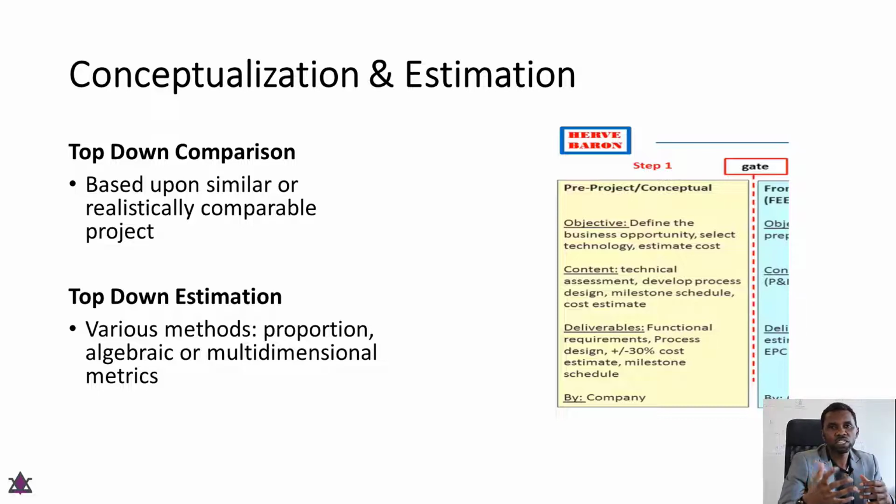So if you are now looking at a project that has never been done before, then you have to break that new project into smaller components, and then look at the closest project that is similar to each minute component of that large new project that needs to be embarked upon. Because not all projects are existing. Some projects may be new innovations that have never been done before. However, every project can be broken down into manageable components.